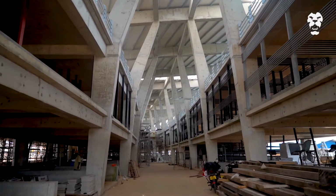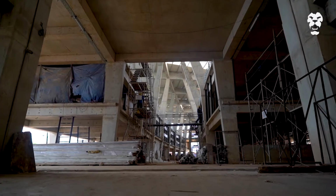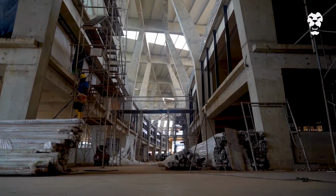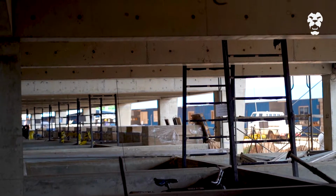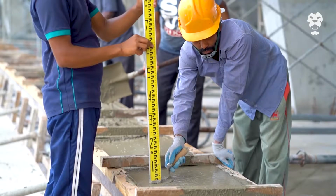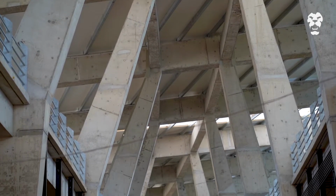The challenging feature was the elevated road structure, which connected the access of the highway. So to make large spaces at the ground floor level, we had to make it a large span structure like a bridge structure. So in that case, we had to design it with precast pre-stressed beams. But again, use of precast pre-stressed beams was also a challenge because the curved shape of this road structure made it different and difficult. Precast beams were narrowed down to 5 different sizes and designed with different widths of support, which allowed a reduction of the total construction time, further simplifying the overall construction process.